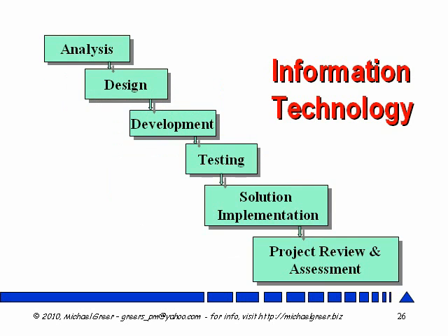Here's another example of how project life cycle affords control for the developers. In an IT project, you would never begin development without solid design specs to work from, and you wouldn't create design specs until you'd done a thorough needs analysis or system analysis. So the IT industry has developed these important control phases to allow for the gradual and high-quality evolution of deliverables.